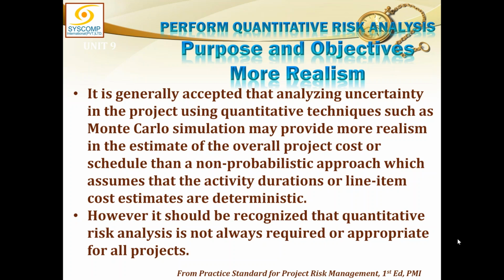Although, for just calculation purposes, for just satisfying your inner self, you can say, well, I have calculated everything. That is okay with you. But actually, you don't know how much really this activity will take. So again, get back to the source and ask them what can be the worst case scenario, what could be the best case scenario. Naturally, any one person cannot tell you that. You probably have to collect this data from hundreds of people who have done this type of activity before, and don't ask them the worst case or best case. Just ask them how much this activity is going to take.